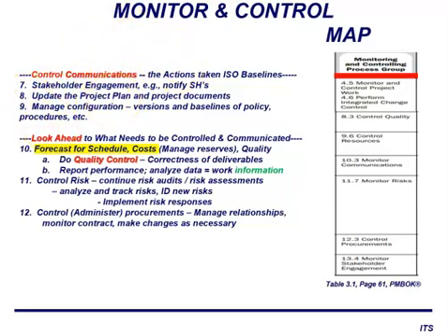It's critical to control communications here. People don't mind changes as much as long as they are aware, as long as it's never surprise your boss. That's the focus. So control communications, make sure people are aware of this change, involve stakeholders, update the project plan, manage your project configuration so the whole team is aware. And then, of course, in monitor and control, take this data you've collected, compare it to the plan that you had before execution, and forecast your schedule, forecast your costs, forecast your quality. Look for new risks, and administer any contracts that you may need along the way.